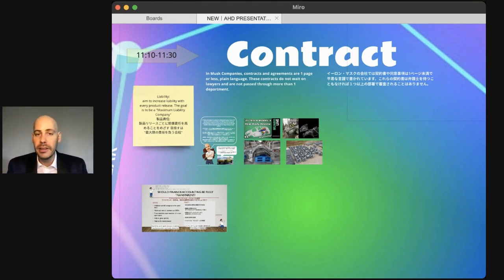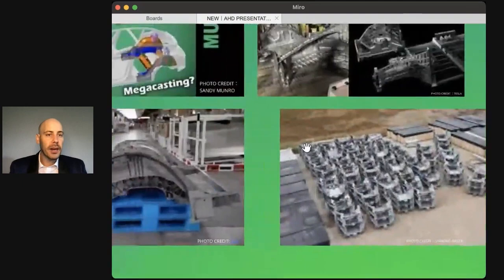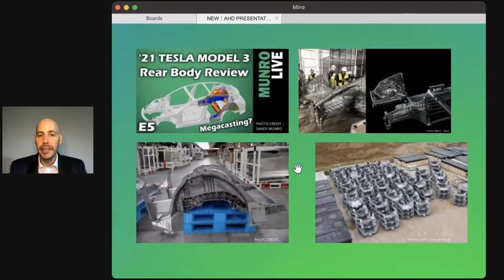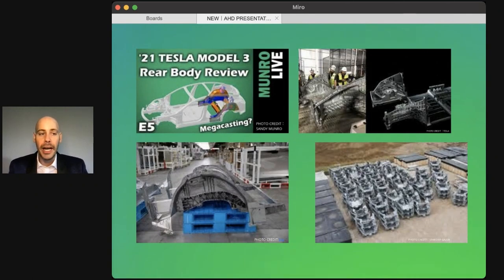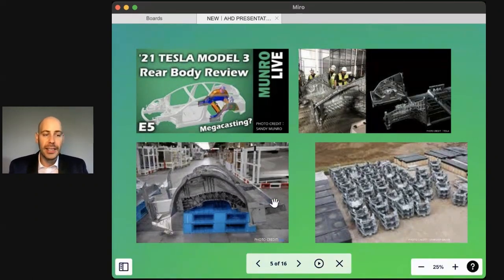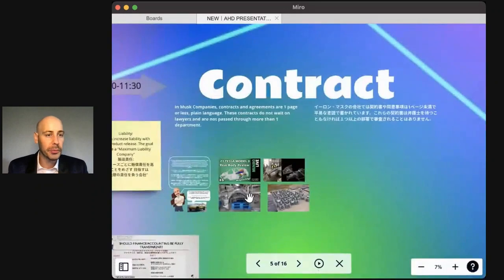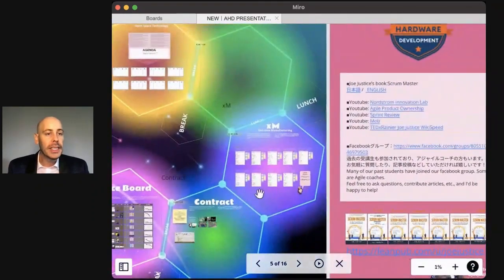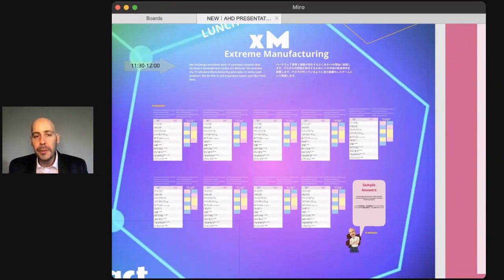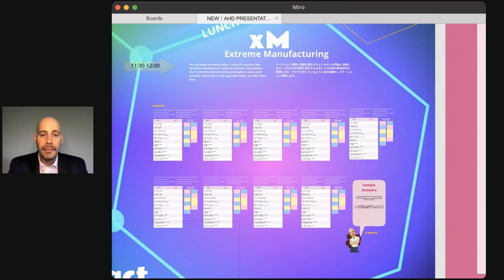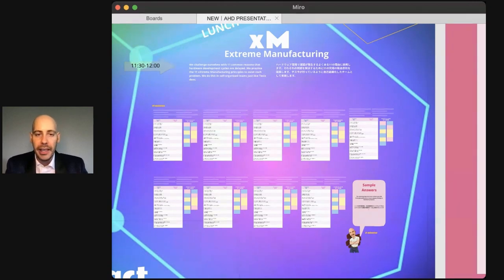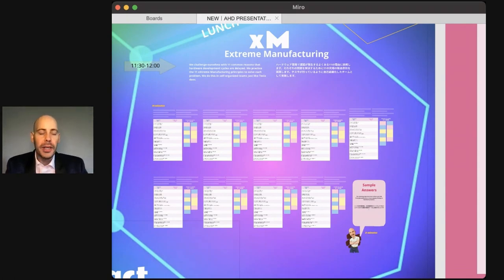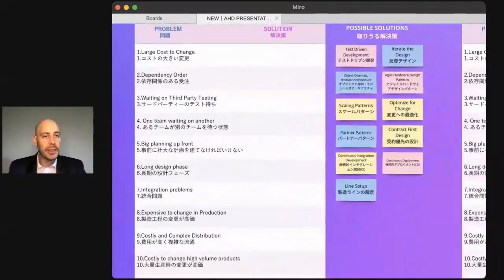Even a company with a very long history as a traditional waterfall company, parts of Bosch are able to do that. The giga castings are made by a set of suppliers. These castings change every 45 minutes by a supplier. Suppliers deliver new die sets and stamp sets every 45 minutes working inside the Tesla factory. Now, in most companies, if you deploy a new design to production, your production teams don't want it. They need to set up the manufacturing facility and capabilities and testing infrastructure for your new design. They would not want a new design in production every day. So how do you have production be ready for a new design multiple times a day? In some cases, multiple times an hour. That's what's called extreme manufacturing.